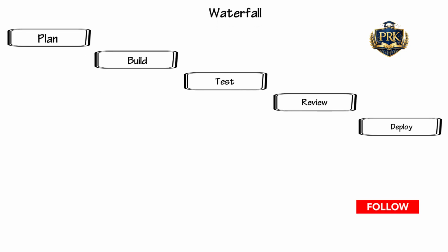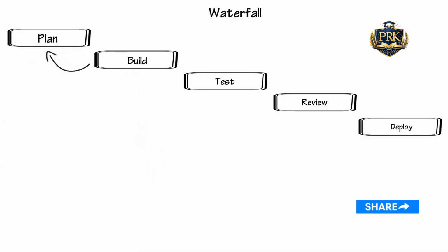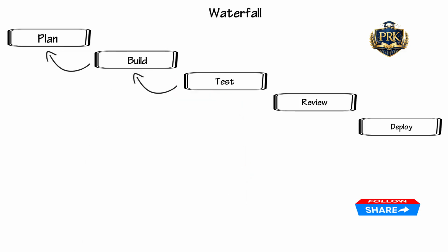There are several problems with this method. First of all, the planning must be completed before any work begins, and in most cases, the planning is done without entirely understanding the project. Once development is being done, oftentimes things get sent back to the planning phase, and the project either needs to start over, or the developers are just criticized for not understanding the plan. This cycle can happen many times.